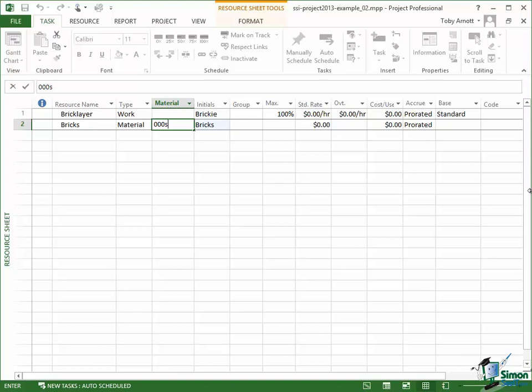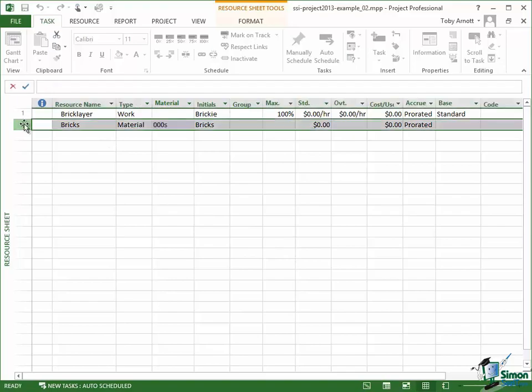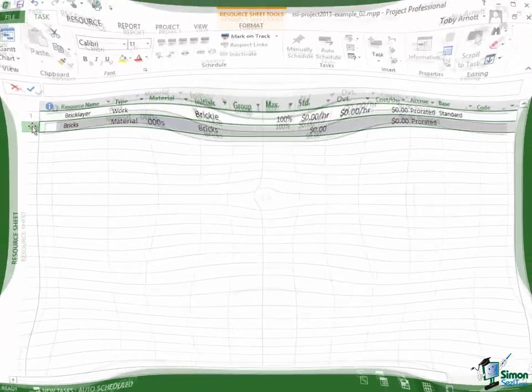So in a typical house I might use say around 10,000 to 15,000 bricks which means that this particular material, bricks, if I wanted 12,000 bricks I would say 12 of this resource because this resource is 1,000 bricks.